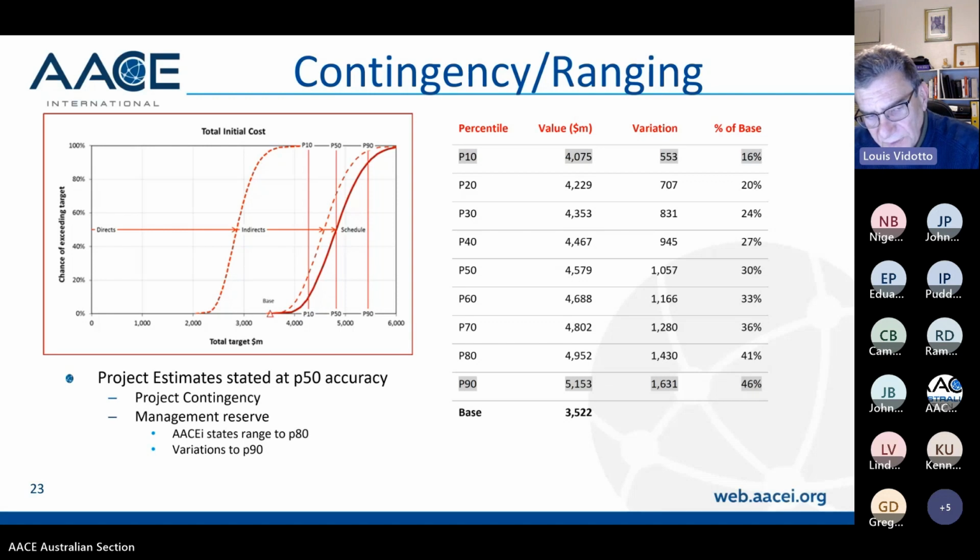Okay, so there's two things. The cost estimate, the budget, really reflects the cost of the scope, and the schedule reflects the time taken to build that scope. In this analysis we tried to link cost with schedule, so a schedule delay would cause a cost increase. And all your better projects do have the cost and schedule linked, because if you don't have them linked, there's a disconnect and people get more confused. It's a lot harder to manage the project if your schedule and your cost basis aren't referring to the same thing. So yes, your cost contingency and your schedule contingency should be representative against each other. But it all comes back to documenting everything.